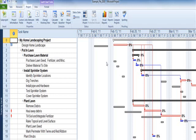Project's visual reports and standard reports rely on baseline data to convey the information you need to manage the changes in schedule and the changes in work in your project. In visual reports, the information is found in the Assignment Usage category.